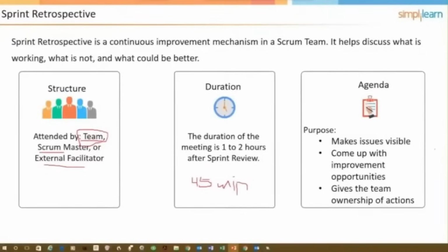And what's the purpose? There's the agenda for the retrospective, 3 questions. What worked well? What did not go well? What are we going to do different? And it's not just a chat session. Well, that would be part of it. You will use tools and techniques, like some that I mentioned, control charts, Ishikawa diagrams, 5 whys. There's a number of things that you might use in order to surface assignable causes for issues so that we could then come up with a resolution to those.